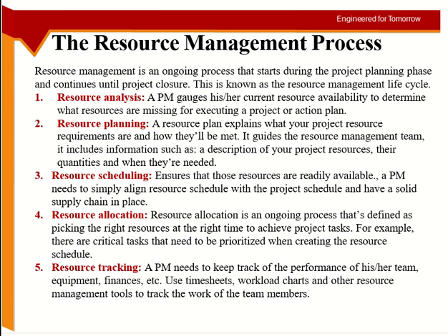I explain to you the concept of reducing idle time and increasing the utilization of the resource. How I can use fewer resources more efficiently. You try to align the resources according to the schedule of the project to see when they will be required, and in this way you may be able to use fewer resources on multiple projects by just managing the schedule properly.